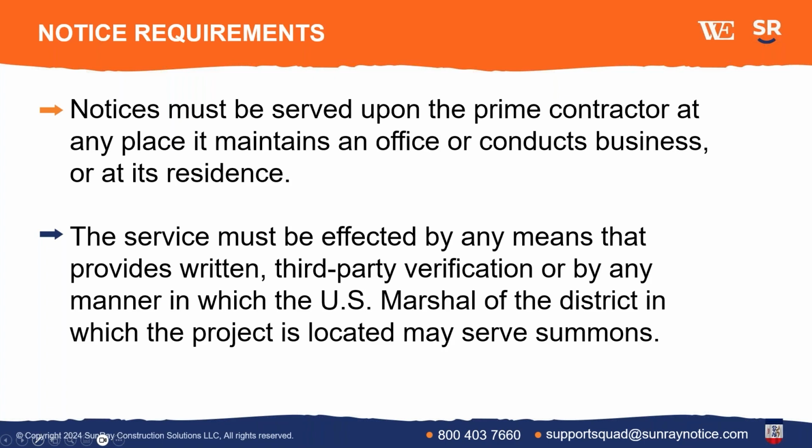So for example, if a third party emailed the notice to the prime and there was complete evidence they got the notice by the email, you're probably going to be okay, because the courts look at whether the claimant hired someone who actually delivered the notice to the prime.